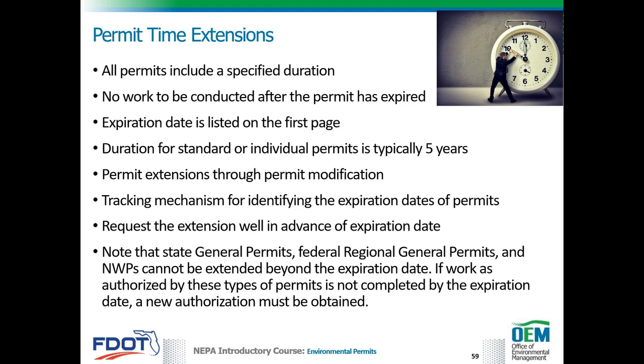Note that Coast Guard bridge permits specify that the permit becomes null and void unless construction of the bridge is commenced and completed by certain dates. This time period is usually 3 years and 5 years respectively from the date of the permit.